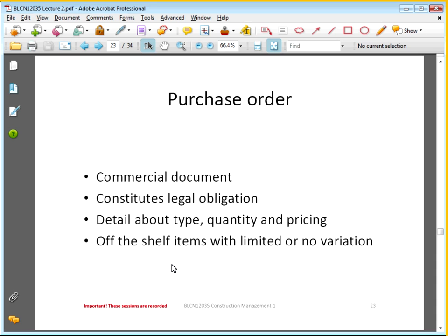A purchase order becomes a commercial document, and of course the moment we've issued it, there are some obligations we have to pay. It creates a commitment from our side. So vendors are quite happy with that, and they will ship based on that. If you ship from overseas, obviously you might have to work in a few other items as well. For instance, payment is always an issue, especially if you work in Africa. European vendors typically don't want to supply stuff to the African continent without having their funds cleared in the bank. That's just a precaution from their side to make sure that they do get the funds in place.